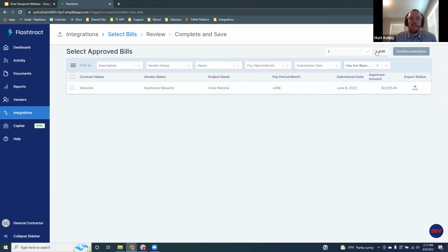And then we also have up here this pay period control. And really what this allows you to do is enter in what we call pay control number. And really what this is, is a way for you to relate these submissions back to your owner bills. So if you put in, this is the first owner bill, you'll be able to know once you get paid for your first owner bill that corresponded to these submissions that you exported. That way you know which invoices from your subs would get paid out after you get paid.